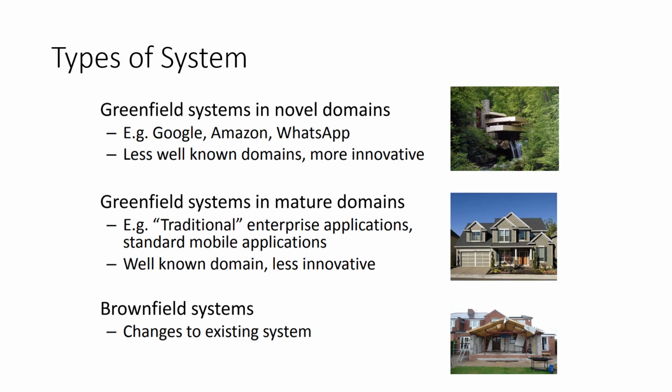I can also add more things into work in progress documents, such as something for future design reference, etc. The amount and pace and the content of the architecture documentation also depends on whether it's a greenfield or a brownfield system or project. A brownfield system needs more upfront documentation because there are existing customers, existing integrations, and we do not want to break things.